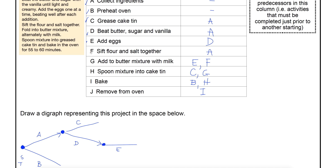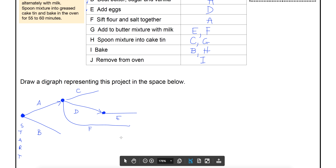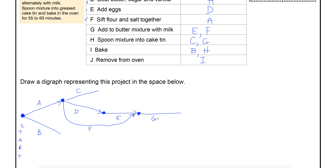Now I'm up to F. What does F require? Just A. So F is actually coming from A as well, all the way back here. Notice we're drawing them so they're headed towards the finish at the other end. G has predecessors E and F, meaning both of them have to be completed. So I'll bring F around to meet E, and when both of those are finished, G can begin.